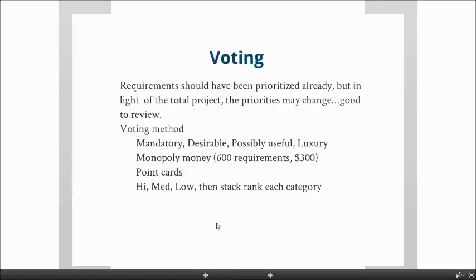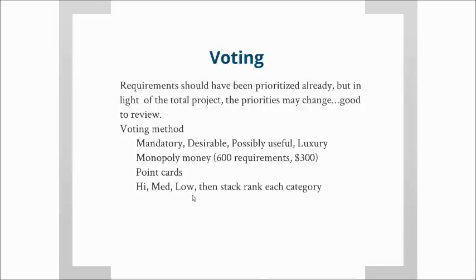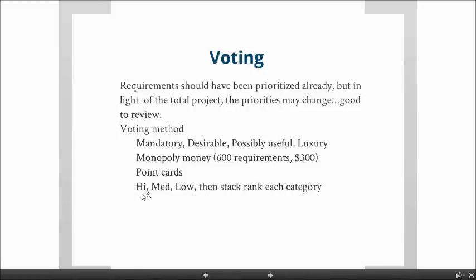I don't like that. So what I like to do is just quickly go through requirements and get people to say, hey, this is high, medium, or low. You tell me. Go through this requirement. They say, oh, it's a medium. Five people say it's a medium, three say it's a low, one says it's a high. You just say, hey, can we just agree that it's a medium? So at the end of that, you'll have a big list of highs, a big list of mediums, and a big list of lows, and then you go through all the highs and you stack rank them.